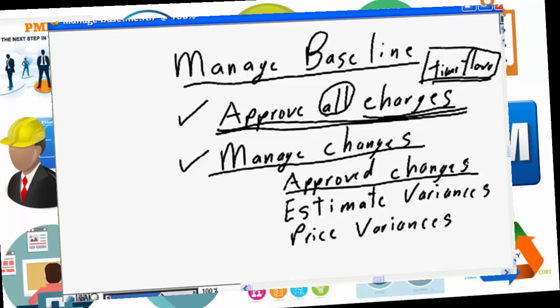When it's an approved change, it is actually a physical change to the project baseline. If through the change management process you have added incremental value to the project of an additional $15,000, the baseline is now $15,000 greater than the original project baseline. Changes, in fact, do change the baseline. If it's an approved change, you change the baseline. You therefore have a different yardstick within which your project is being measured.